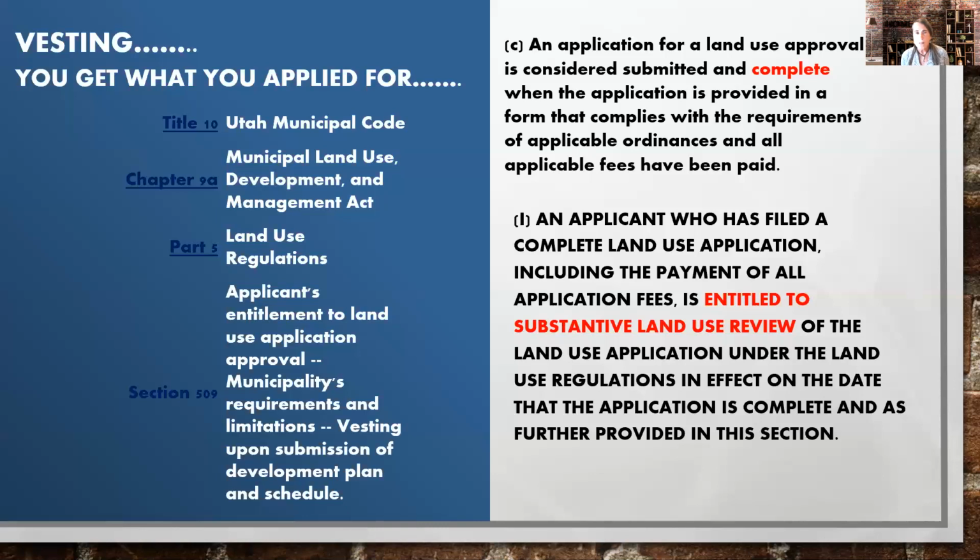Are you going to do all elements, some elements? Are you adding new elements? What is it exactly that you guys want to achieve? And they held a joint meeting. It was a work meeting, and they went through the details. And they came out of that with a work plan. And then every 6 months, they held another joint meeting to check in with the planning commission. Because again, the council's part of that team doing the outreach and garnering that information.